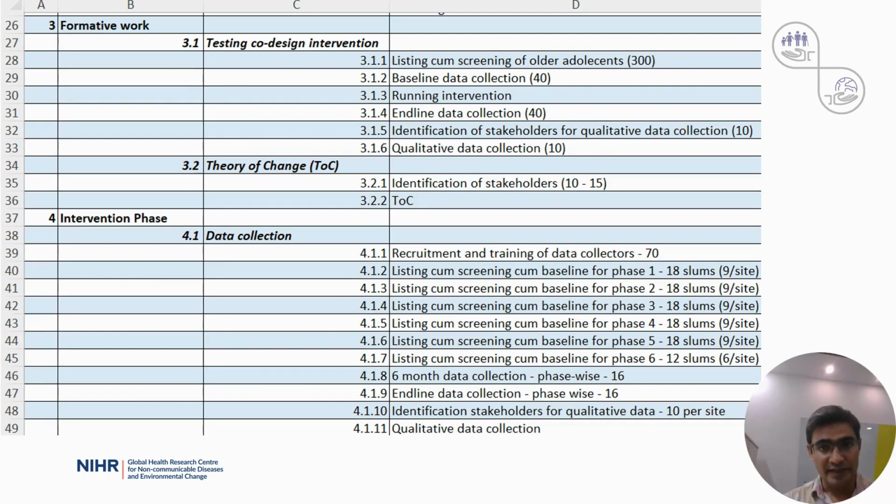We will repeat the same process here for phase 3, phase 4, and phase 5, which is the post-trial phase. Once we finalize the WBS for all phases, it's important to review everything again carefully to check for any gaps or missing pieces. For example, while revisiting the tasks under the data collection phase, I realized I had missed a crucial task, that is setting up the database for data collection. It's a crucial step for ensuring smooth and efficient data collection.